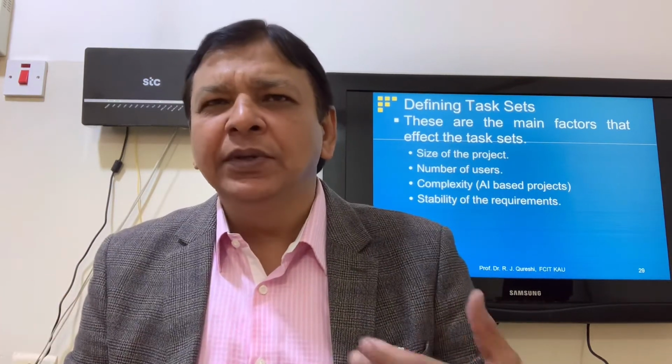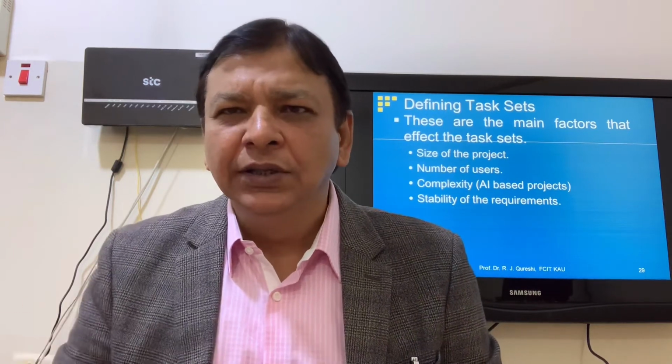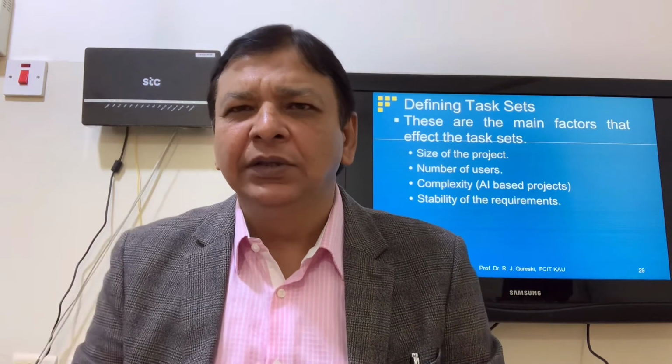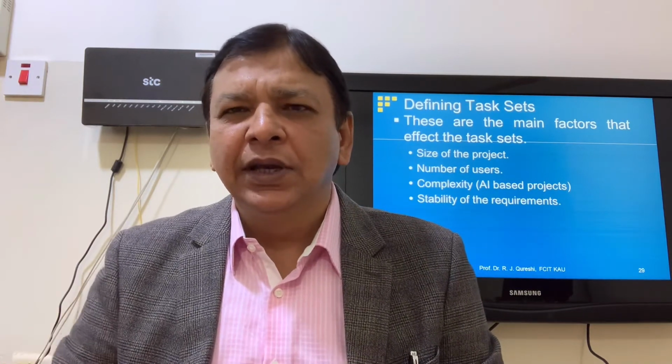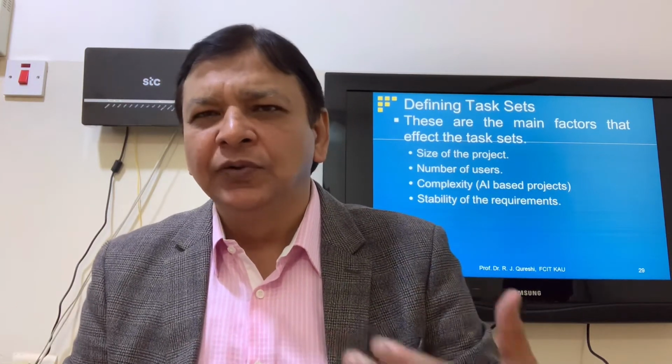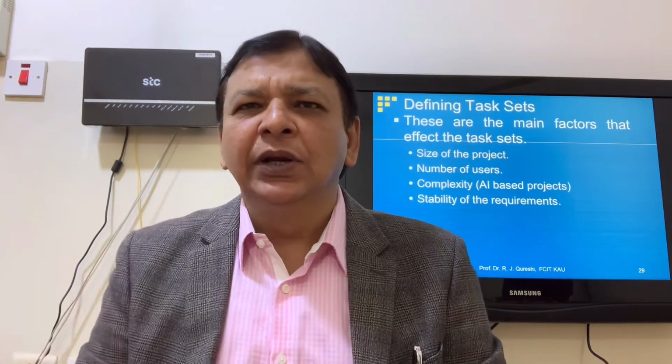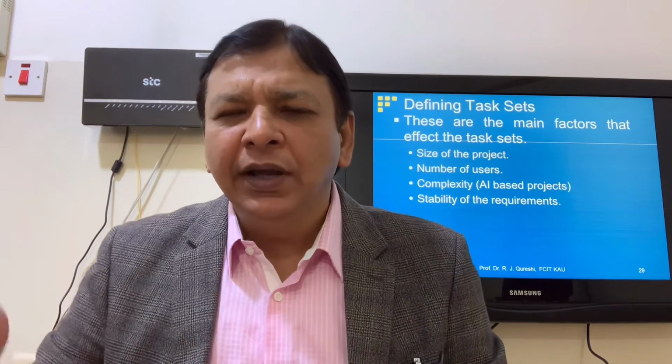How much are requirements stable or are they changing? In case of stable requirements, we use waterfall methodology. It's recommended because in case of cost optimization, we use waterfall methodology. But if it is changing requirements, then we recommend Agile methodologies.